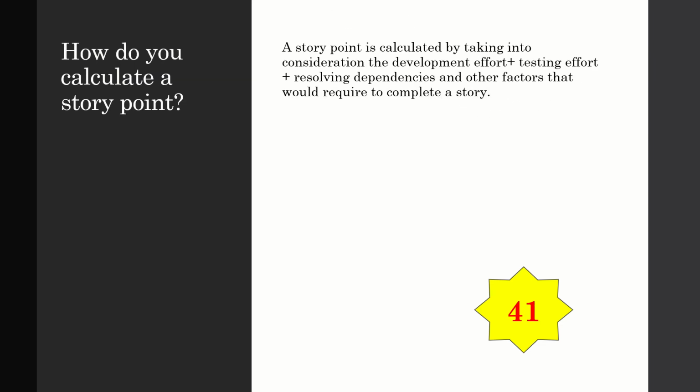How do you calculate a story point? A story point is calculated by taking into consideration the development effort plus testing effort plus resolving dependencies and other factors that would be required to complete a story.